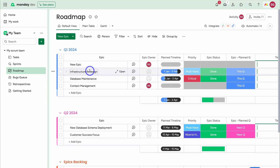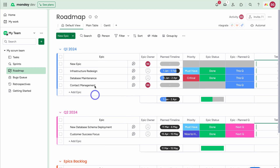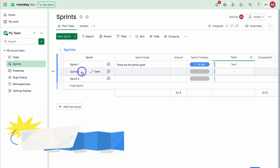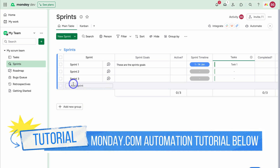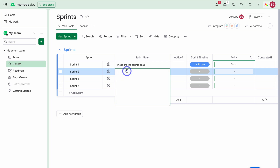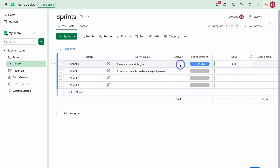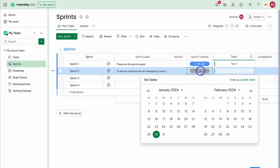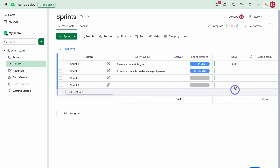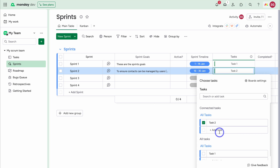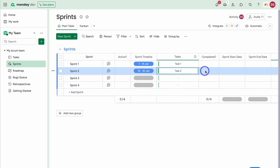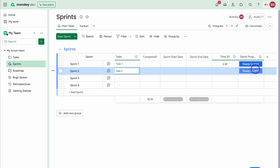Once you've managed your epics and allocated them to different quarters, move on to Sprints. By default using scrum, you add your sprints — I'll add Sprint 4 — and name them anything you like. Then add your sprint goals. Navigate across to Active; you can see each sprint is not yet active. All sprints must have a specific timeframe — typically one month or less. I'll add a timeframe of the 16th to the 30th. You can also connect another board and search for a specific task to link it. I'll link Task 2, then navigate across to see sprint completion status, sprint start date, end date, total story points, and sprint progress.